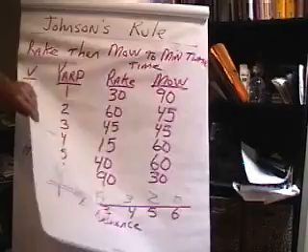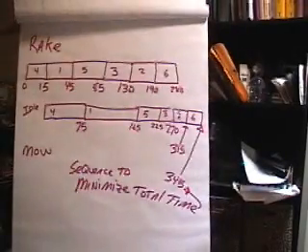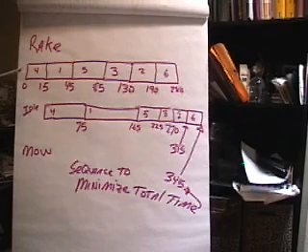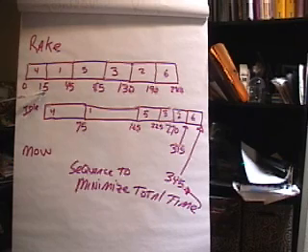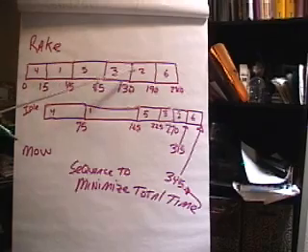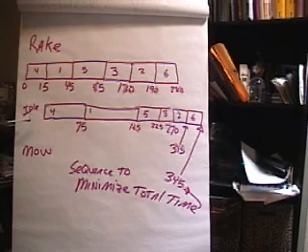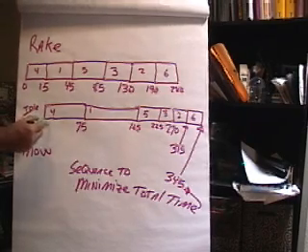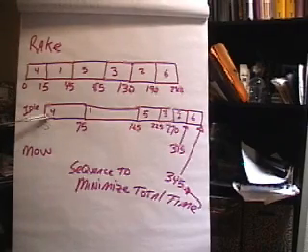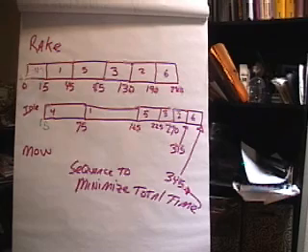So how long does it take to complete all those jobs? Well, let's look at this Gantt chart here. So we start raking on yard number 4, and we complete it at time 15. Then yard 1, and so on. 4, 1, 5, 3, 2, 6. We complete the raking at 280. We can't mow until we've completed raking. So for mowing, we're idle for the first 15 minutes. That's when we can start job 4, which is completed at 15. First rake, then mow. We complete that at 75.